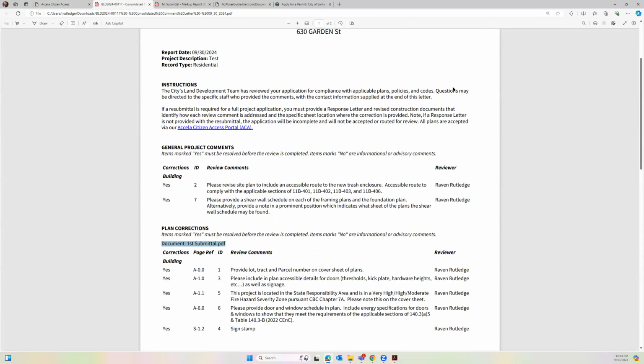Raven, there's a question in the chat from Crystal. Will we be notified automatically by email when corrections have been completed by city staff? Not exactly when they are completed, because essentially what ends up happening on the staff end is it goes onto a report that the counter staff go through. So if the last person reviewed yesterday, the second that person's done, it goes on a report. Just know that the permit techs work on reports, they print them in the morning. So generally, if the review was finished today, they're likely not getting to it till the next day.